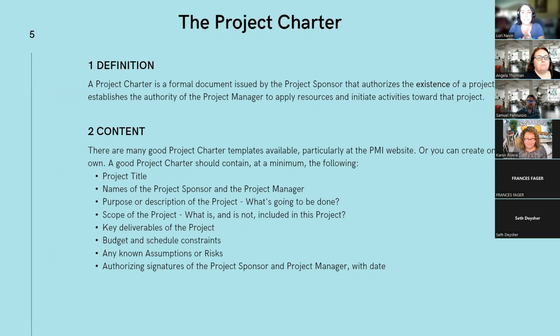Okay, so the project charter is a formal document that is issued by the project sponsor that gives authority for the project to even exist. So why are we doing this project? Why do we need to spend this time and money to do this thing, whatever the thing is? So this establishes the authority of the project manager to apply resources and to initiate the activities toward that project.